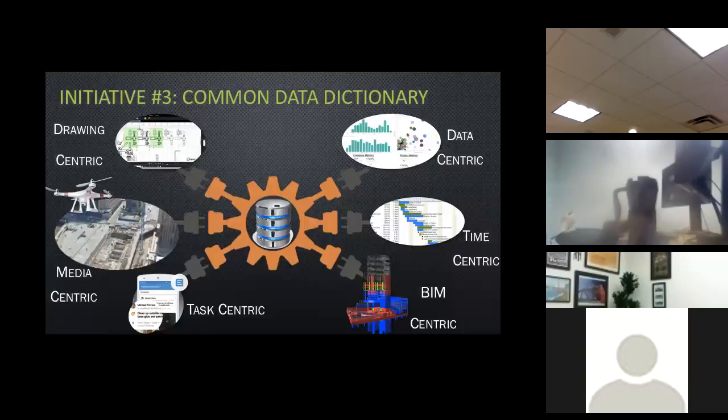Most of the owners that I work with in higher ed and healthcare have fairly sophisticated document management systems. If you truly want to create a document data standard and have it set in action, we need to find out what the owners' organizations are using to ultimately receive the turnover documentation from us. Talk to those vendors, like Rochelle and Meridian and a lot of the other vendors in that space. Understand and get them involved in the process, because I always live by the golden rule: he who holds the gold gets to make the rules.